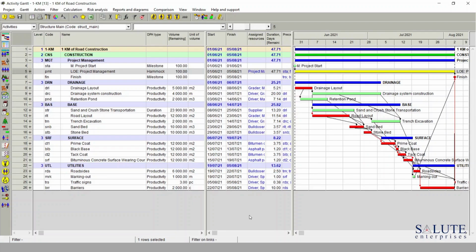And we established the connection of resources consuming materials where applicable. We've assigned costs to activity directly, and that can be done via a fixed, volume or time-based approach. Now we can look at how to calculate the estimated cost.